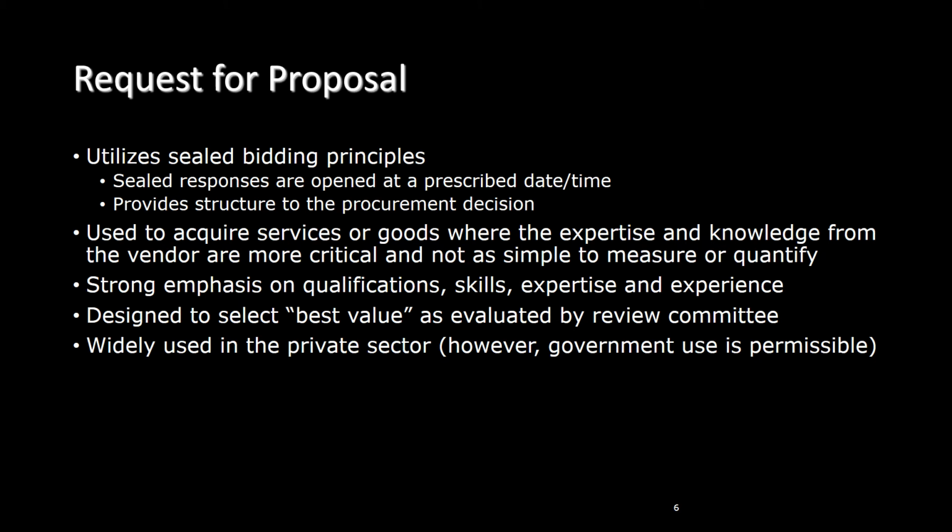The RFP document presents preliminary requirements for the commodity or service and may dictate to varying degrees the exact structure and format of the supplier's response. A key characteristic of an RFP is that it typically involves more than a request for the price. There is strong emphasis on qualifications, skills, expertise, and experience. Other requested information may include basic corporate information and history, financial information, which asks can the company deliver without risk of bankruptcy, technical capability, or where the requirement could be met by varying technical means.